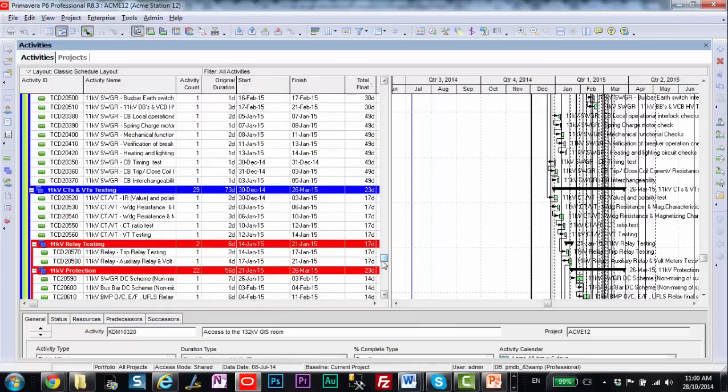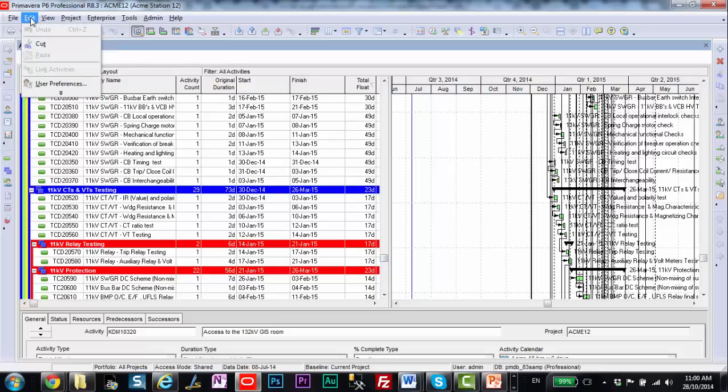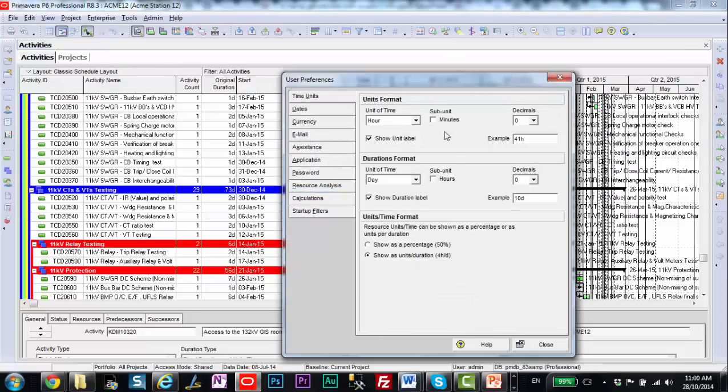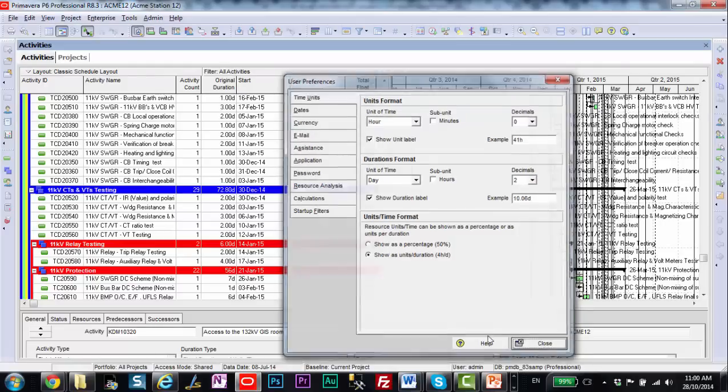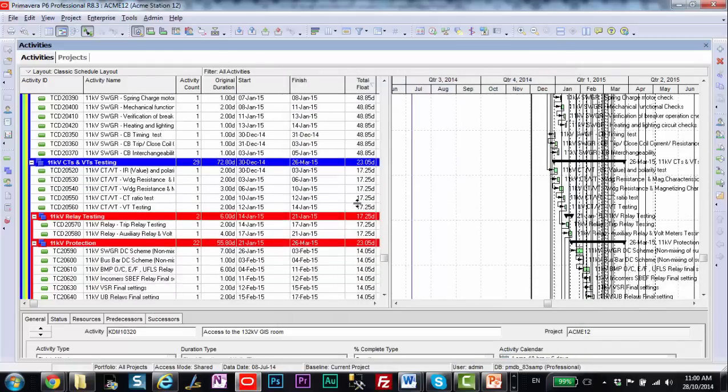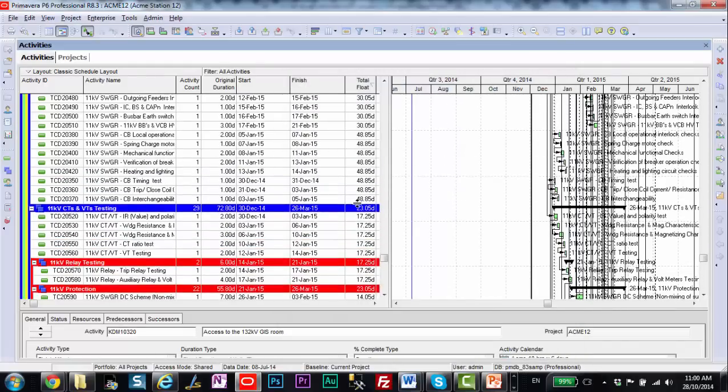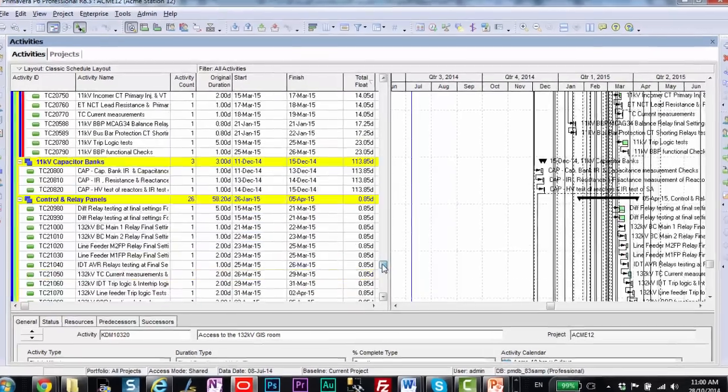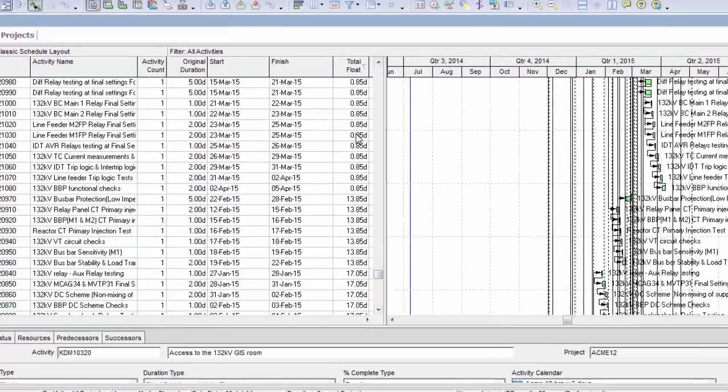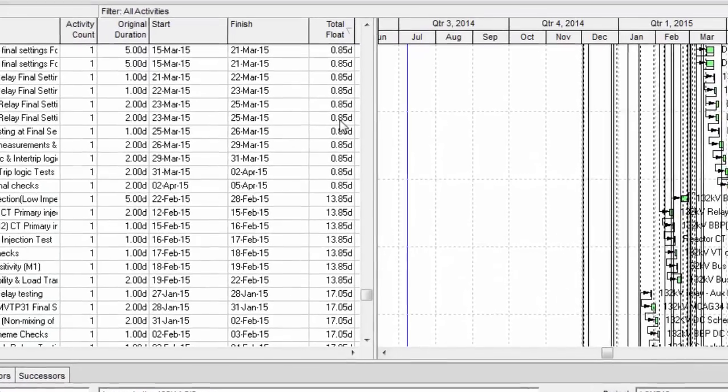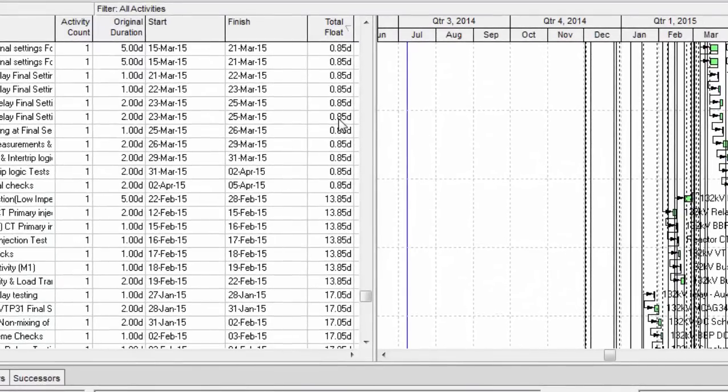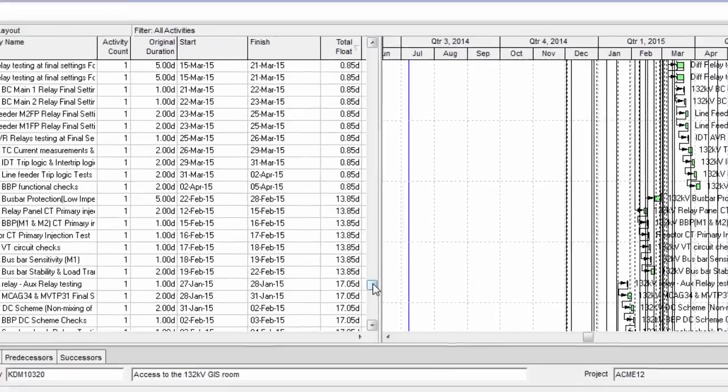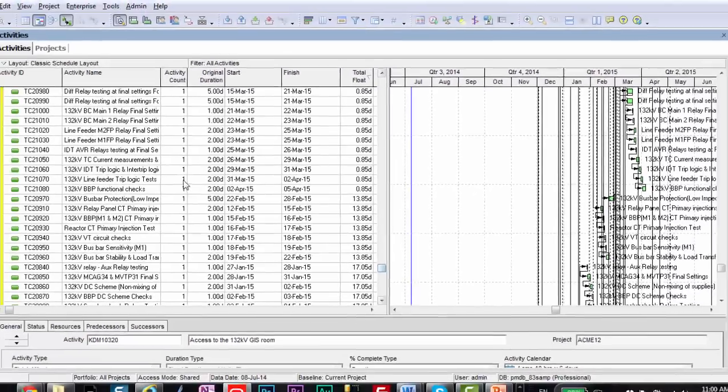But we might have some things hidden if we turn on the decimals. So let's go into Edit User Preferences and Time Units, and we'll add two decimal places here to our durations. Great. Now when I do that, have a look at my total float values. This should be an indicator for you right now. Total float values where they used to say 1, now they say .085 days. That's curious. What's going on there? Might be something to do with the calendar.